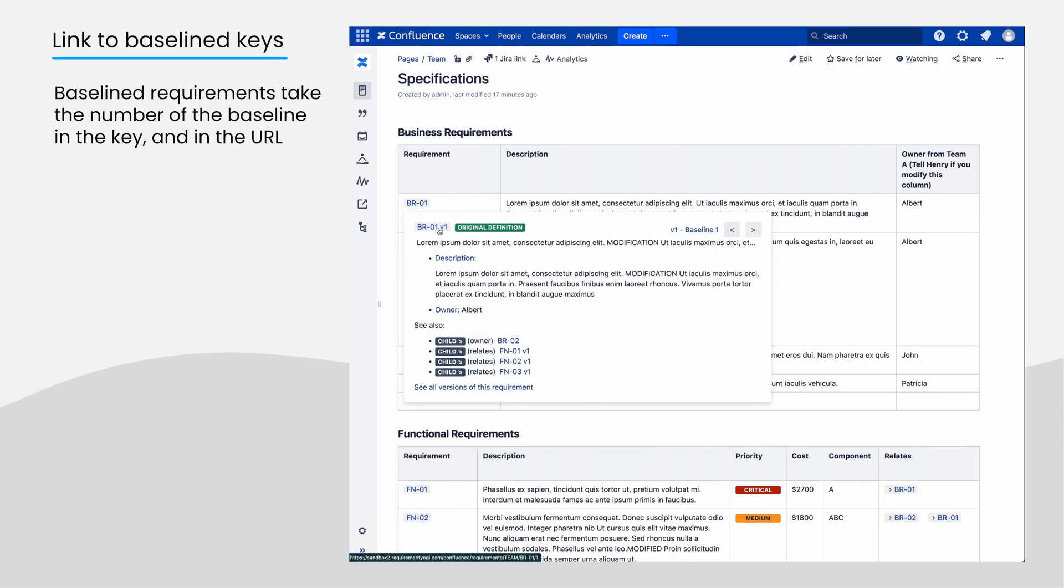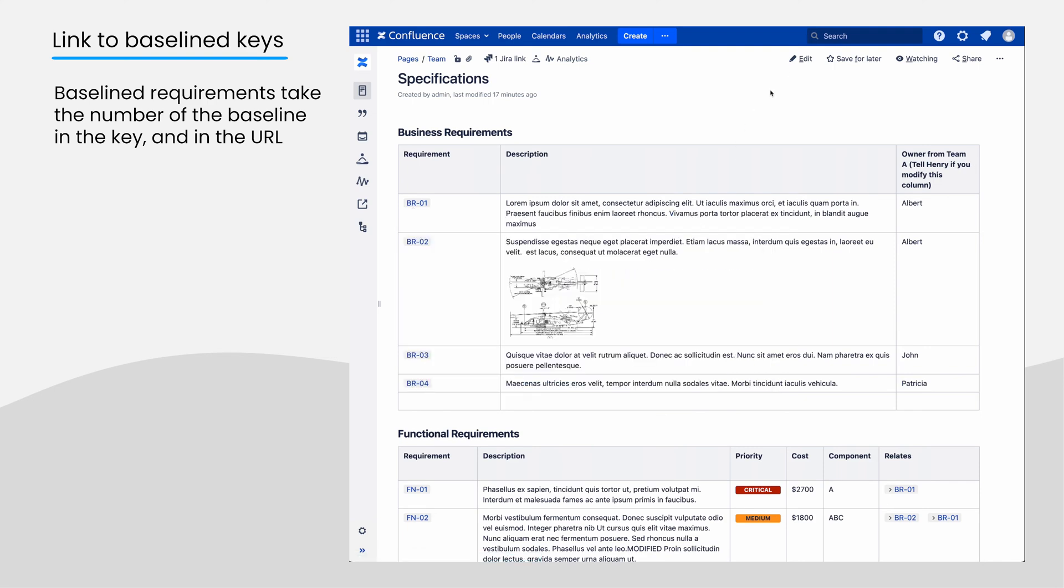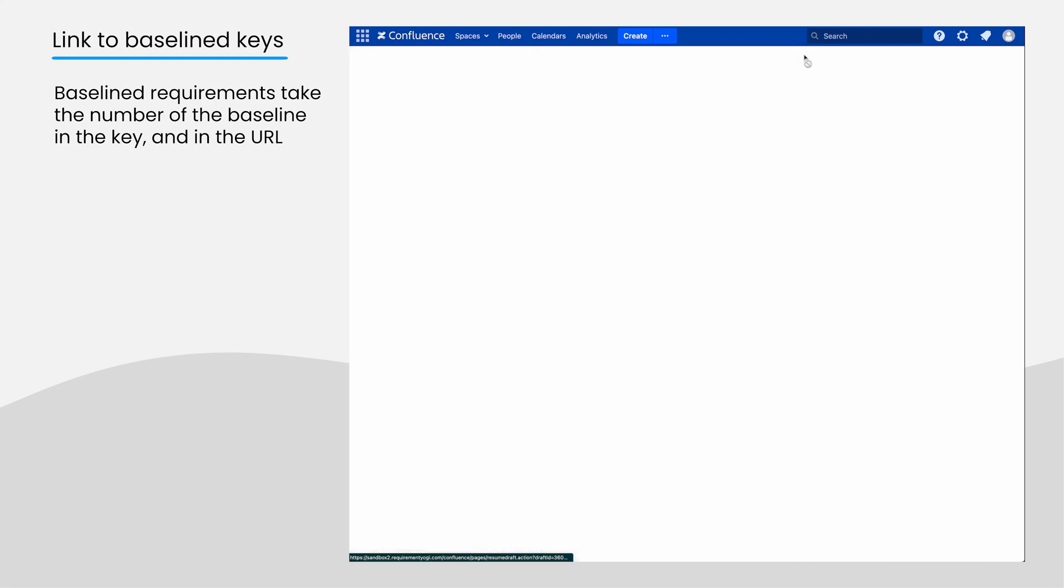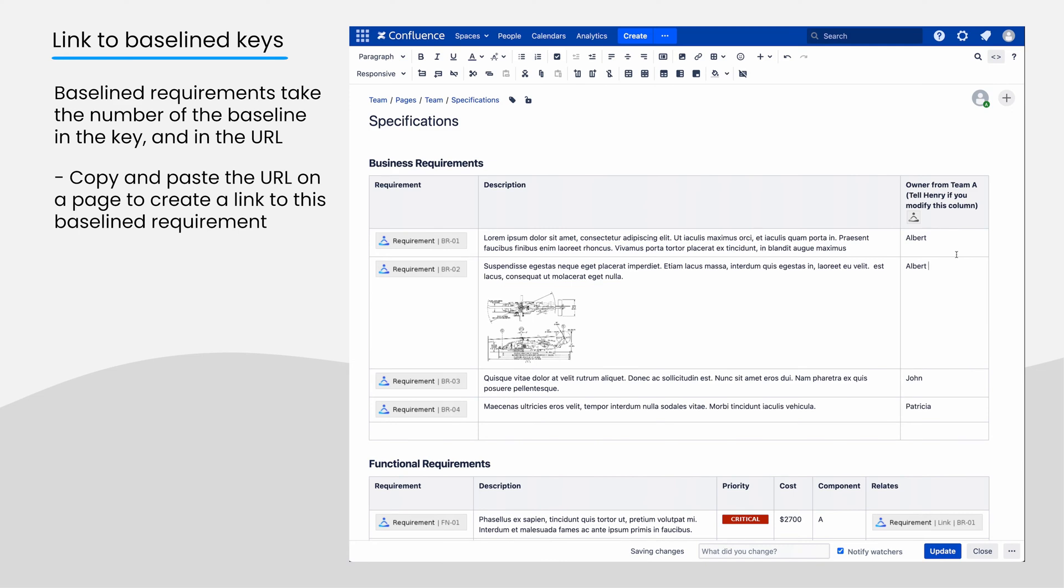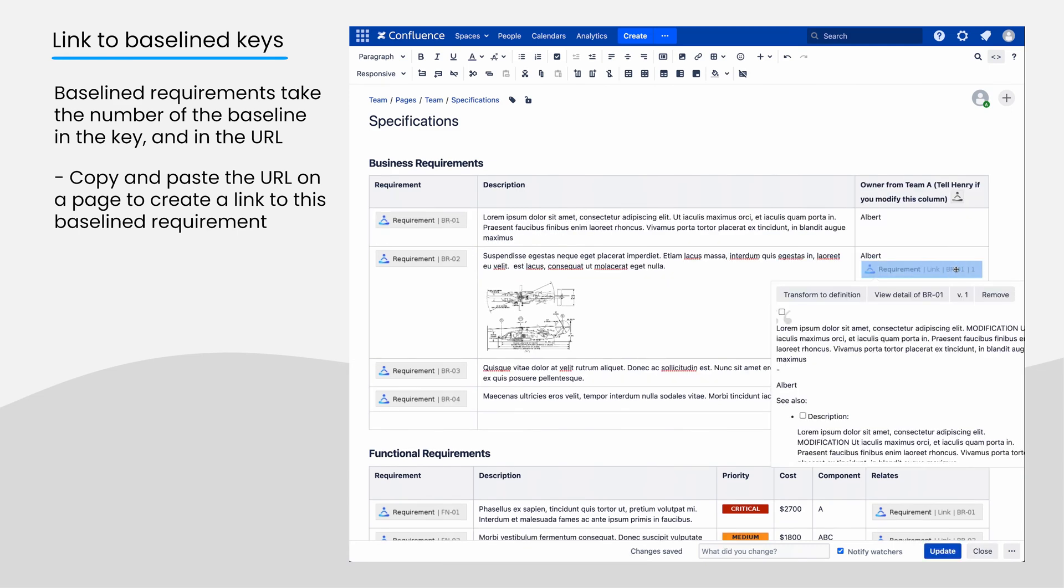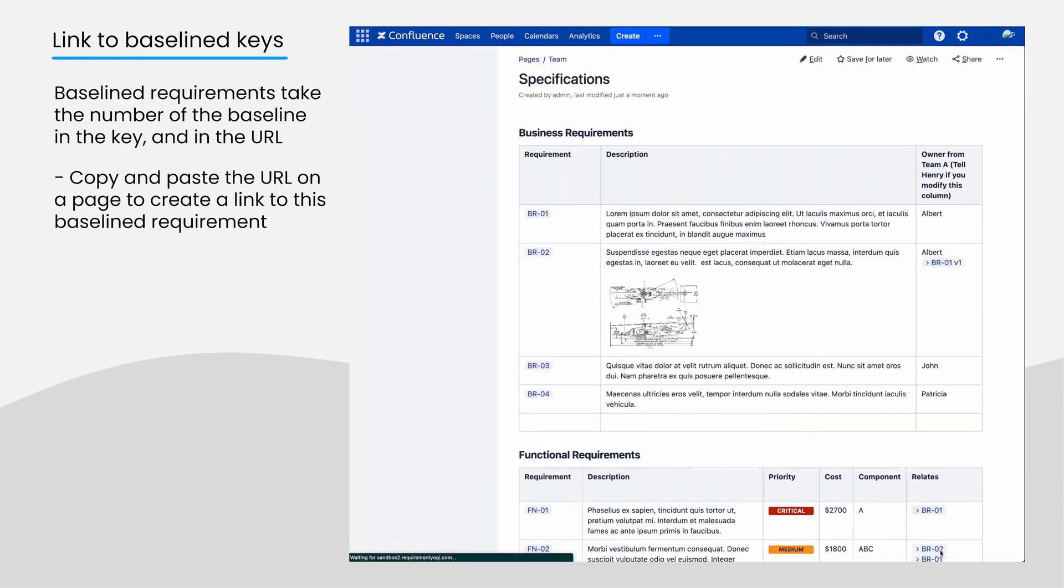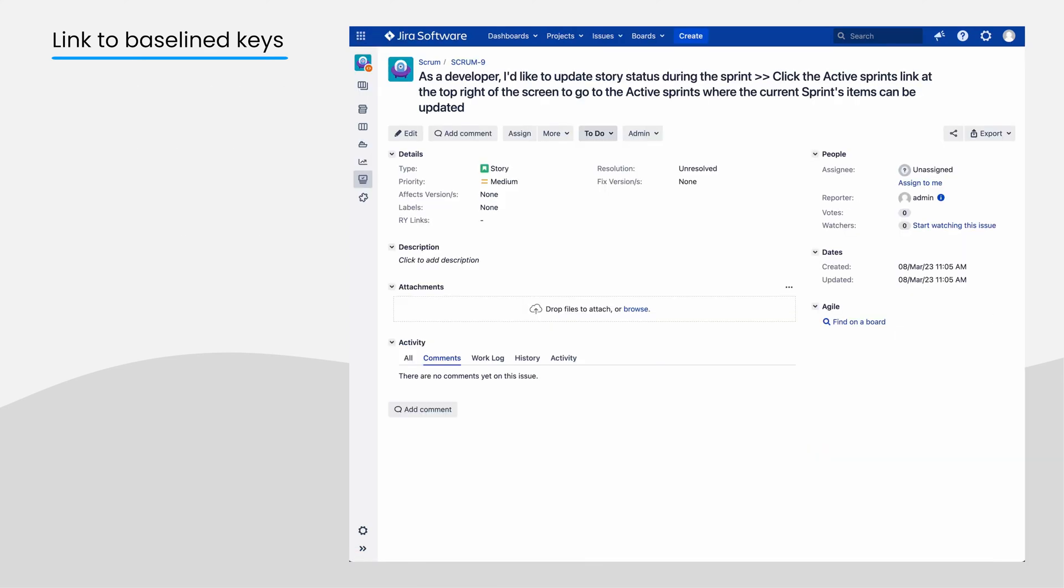Baselined requirements have the baseline number in the canonical URL. This URL can be pasted on a page, and it becomes a link to the baselined requirement. This URL can also be pasted in the search box in JIRA when you want to add a link.